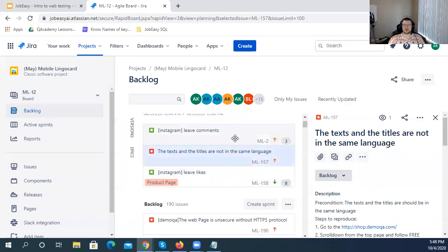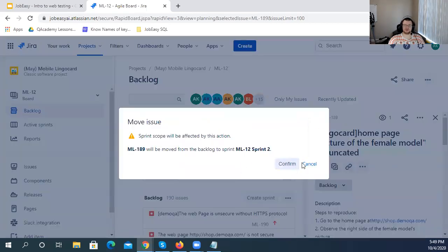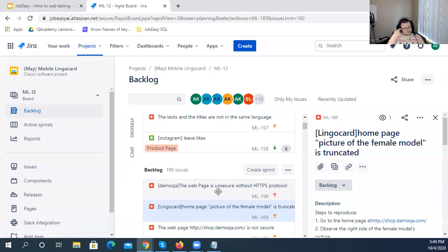And then when the sprint ends, those stories get out of the backlog, out of the sprint. They're just going into the history like an archive. And the team discusses how the sprint went. Was it good? Was it too much work? Not enough work? Was it complicated? Were there any issues? How were the issues solved? And then the new sprint starts. And when the new sprint starts, new stories are selected, and new features are being worked on, and it goes and goes and goes.